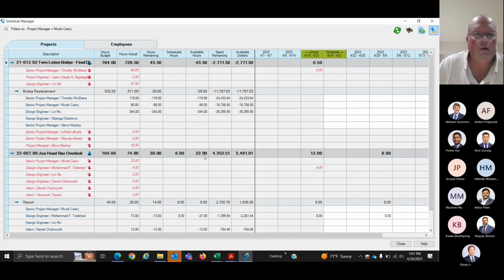You have to be mindful of what you're actually looking at because you might have some budgeted hours, but depending on who you have working on it, that might not work within the budget. Because if you have $100 remaining in a project and you assign someone that's $100 an hour, you have 1 hour for that person. Conversely, if you assign someone that is $50 an hour, you have 2 hours. Yeah. So it's a guideline to use, but you just need to be cognizant of the dollar amount that's remaining as well.